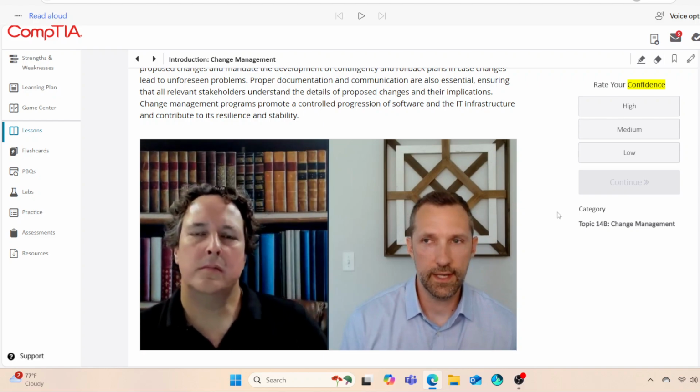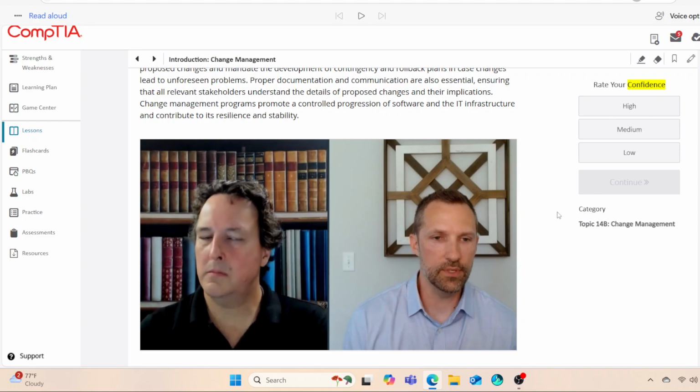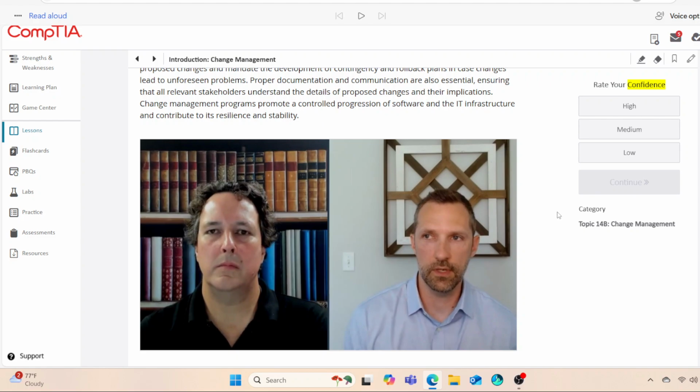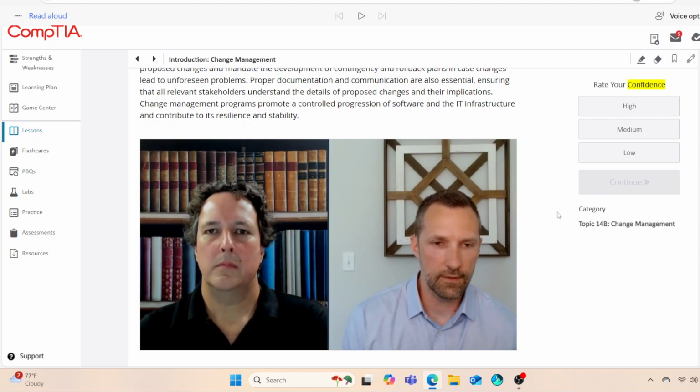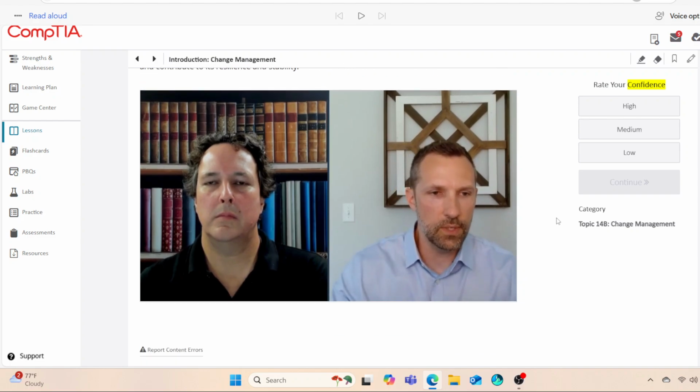Yeah, sure. So I can speak from personal experience. In previous organizations, we called it a change control board, and it was representation from various parts of the organization. So you can imagine we had people from everybody from the chief information officer to the chief information security officer, CTO. We had folks from legal there, heads of different departments in the organization, and we would get together as often as needed, but minimally once a month to review all the changes that people were putting forward to be made.